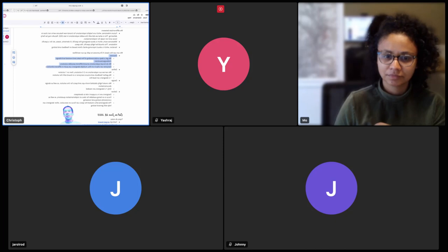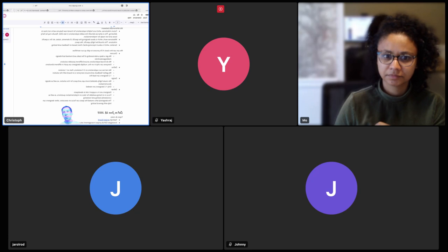Yeah. So I think that's where that process helps too. We've done this in other projects too. So we have these 4 Ds, right? First is discover. The whole group does broad exploration. You can stretch. You define the extreme boundaries of what can be done and gather all the ideas. Then you narrow in on 2 to 3 solutions that are realistic, and maybe some people have different ideas. But then through feedback and discussion, you have to narrow down to 1. And that 1 should pretty much work out, but you don't have all the details.